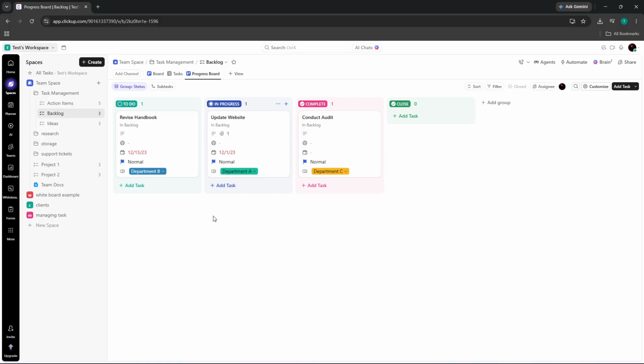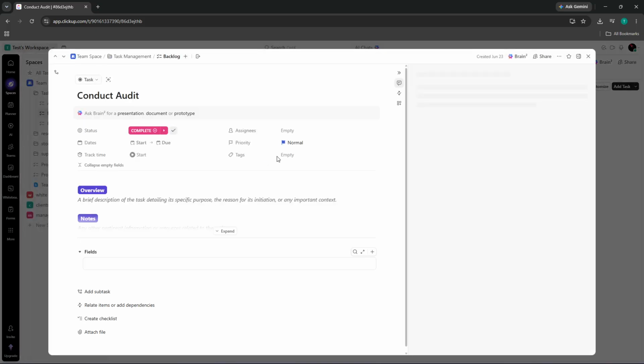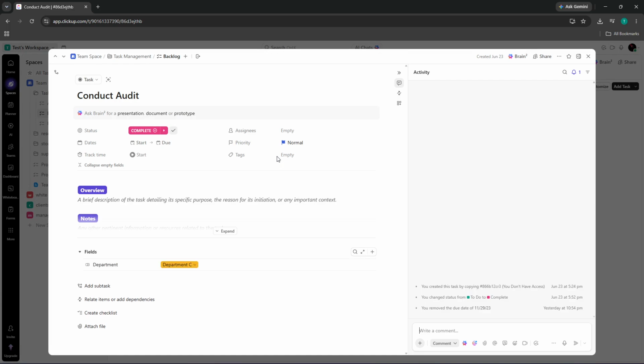Add a detailed description to each task, covering the requirements, the context, and the user need behind it. A well-written description eliminates the back and forth that derails planning meetings. When anyone on the team opens the task, the answers they need are already there. Go one step further and add acceptance criteria, either written into the description or as a checklist within the task. Acceptance criteria are the specific conditions that must be true before the work can be called complete. ClickUp's built-in checklists are perfect for this. They transform a vague idea into a concrete, verifiable target that everyone can agree on.